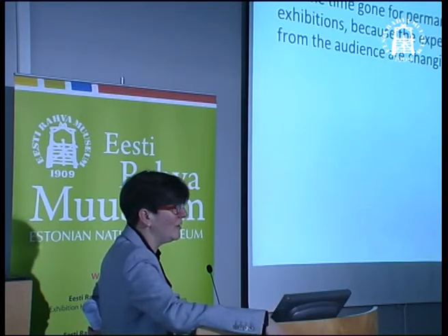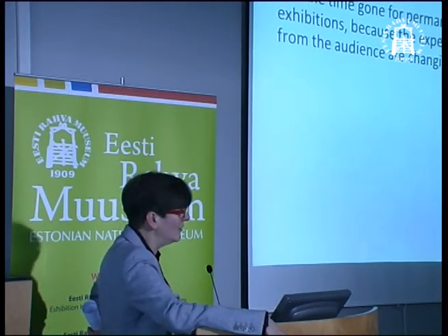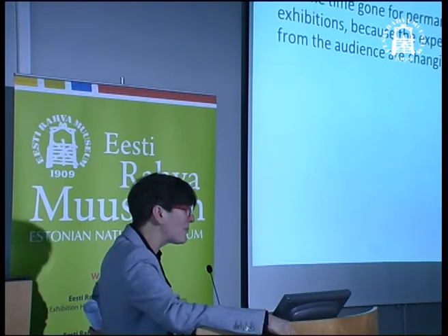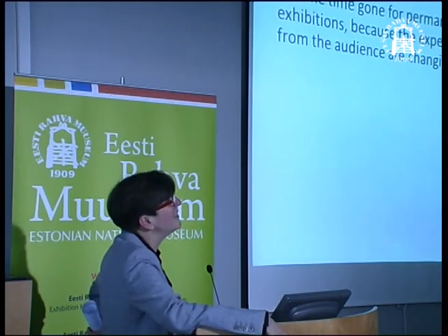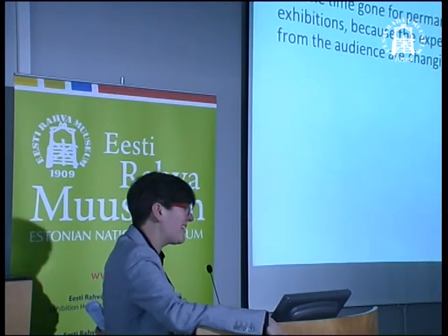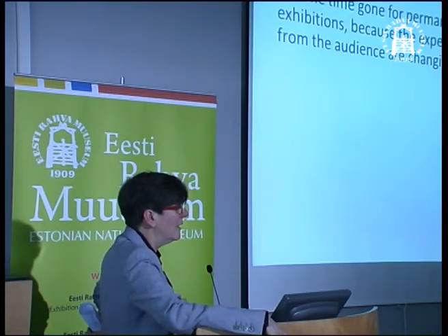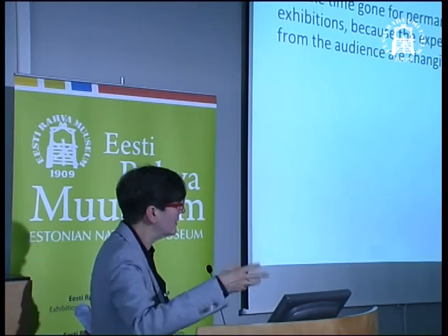And how long did you prepare it? Only 1.5 years. Normally we have 3 years for such an exhibition. So everybody also felt it was quite stressy, and the curators especially, and they said they don't want such a time all the time. But I mean, it was possible, and otherwise I think one has to decide to be less ambitious in some places.